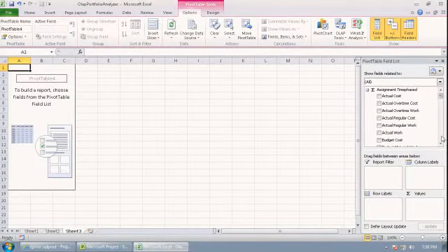In this case, we're not going to look at the assigned work. We're looking at the remaining availability now of the real people. So again, that's the capacity minus the assigned work. That gap is the remaining availability.